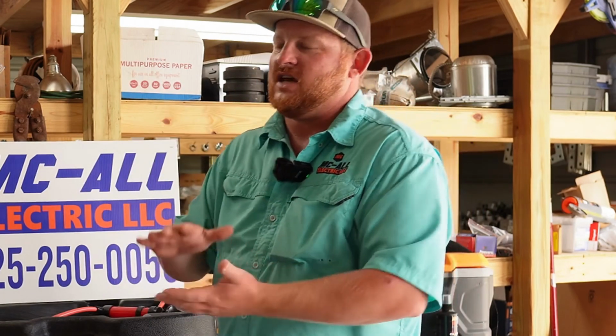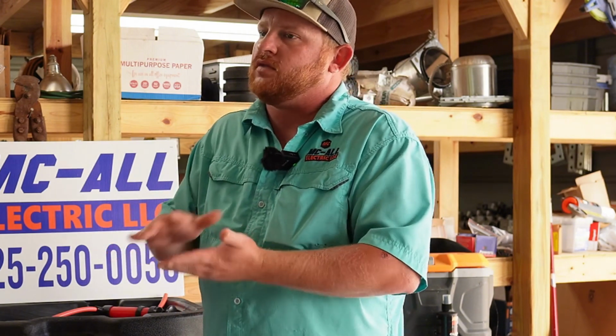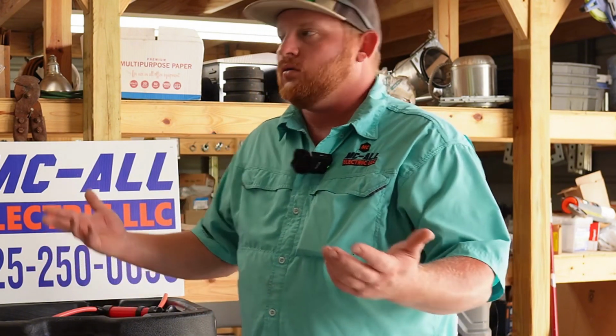So contracts are good, but as an investor or a general contractor coming into something new, you need to be prepared to know that, okay, if my contract is $10,000 to do everything, then I might want to be prepared for 15, because things could fall behind or things will happen. Right. Guaranteed. Or you buy a new house and you start gutting it and you go, oh, we've got major plumbing problems, or we've got to change a panel now. Been there, done that. Right.